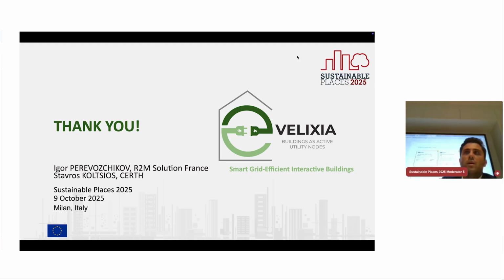We have the cost of the control equipment for the heat pump, and we are able to estimate the cost. Also, we have the cost per impact, so we divide the estimated cost with the impact to see how much I upgrade my building according to what I invest in my building.